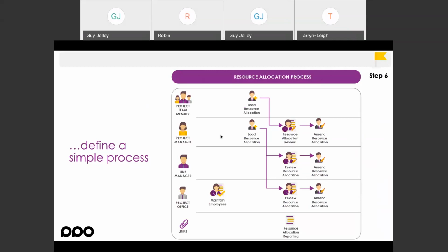It might sound quite controversial, but I found that resources who understand their role on the project and understand what their responsibilities are and the deliverables that are assigned to them have the most accurate view of what their resource allocation should be. So even though the project manager might feel something, the resources have a clear understanding of what the allocation is.